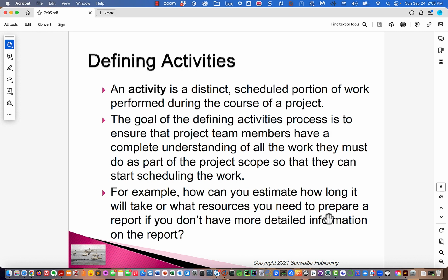One of the most powerful aspects of the WBS is it's supposed to help the team that's doing the planning brainstorm about all the activities that need to be done in order to get the project done. Because again, anything we've promised is part of the WBS. That includes actual parts of the product or service and deliverables that are part of the project management process. So at least in theory, there's nothing we promise to anybody that's not in the WBS.